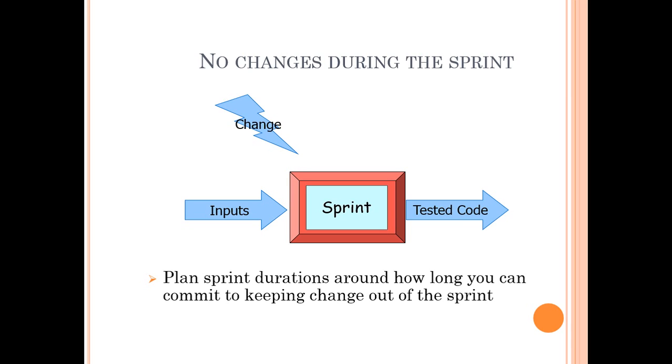Even if a requirement hits the floor, it would be added to the product backlog. We will not add this requirement for the current sprint because the team is not prepared for that. So, strictly speaking, scope is frozen for the current iteration or sprint. We will do only what we have defined or committed during the sprint planning meeting.